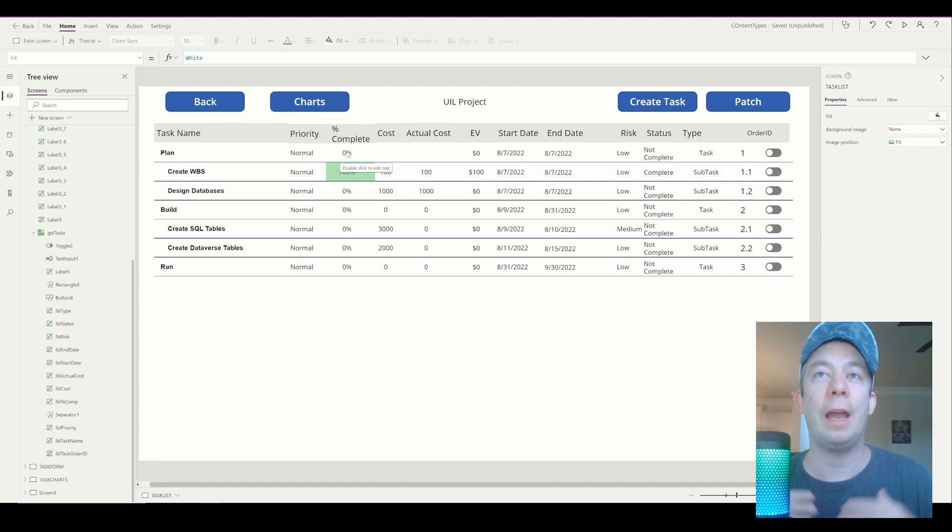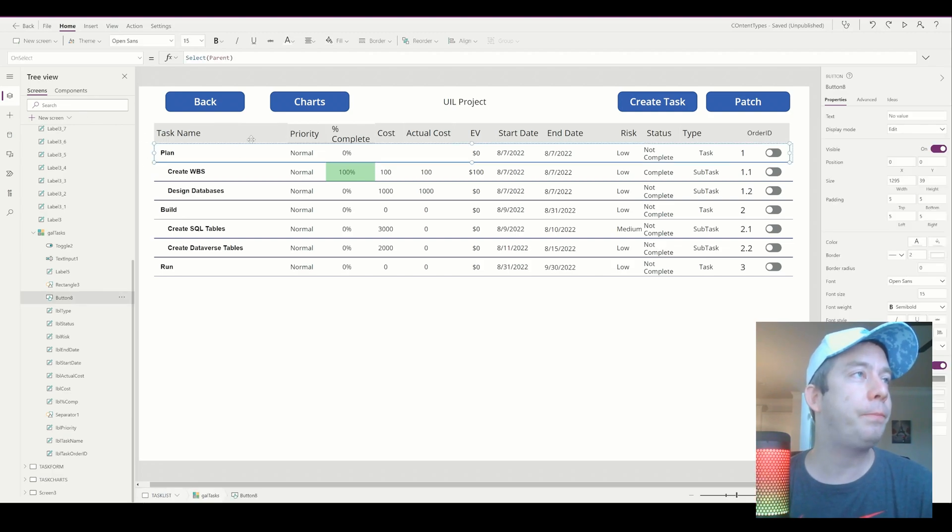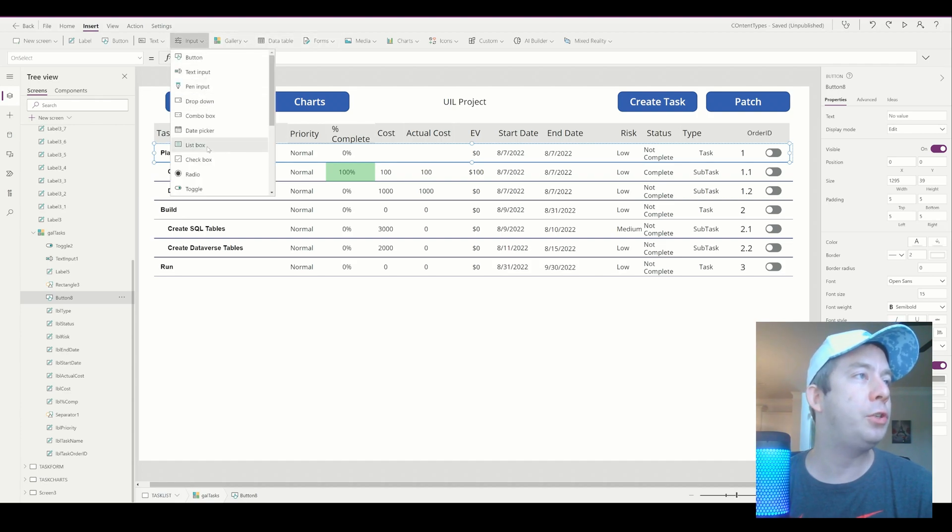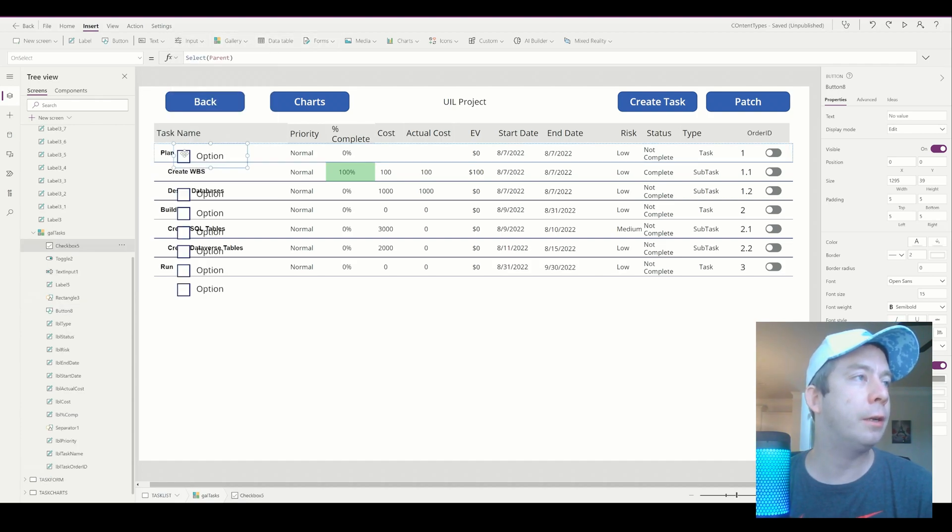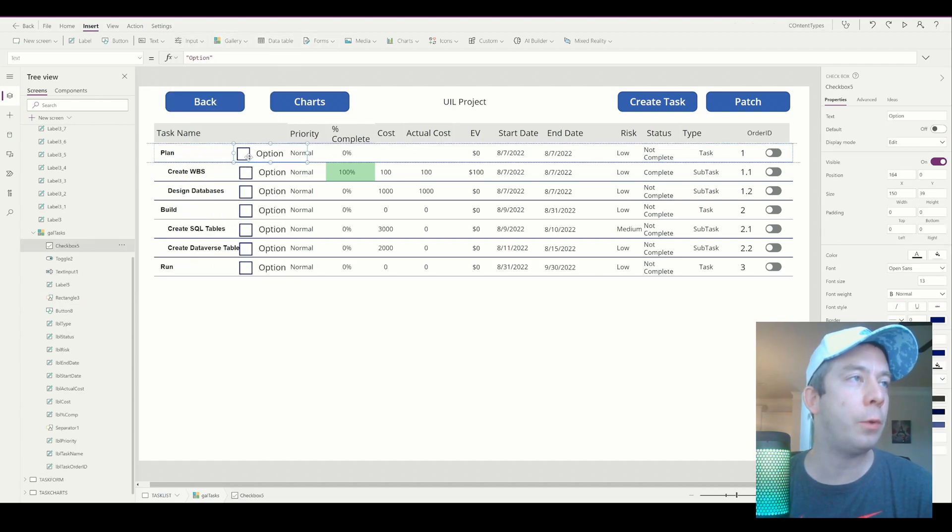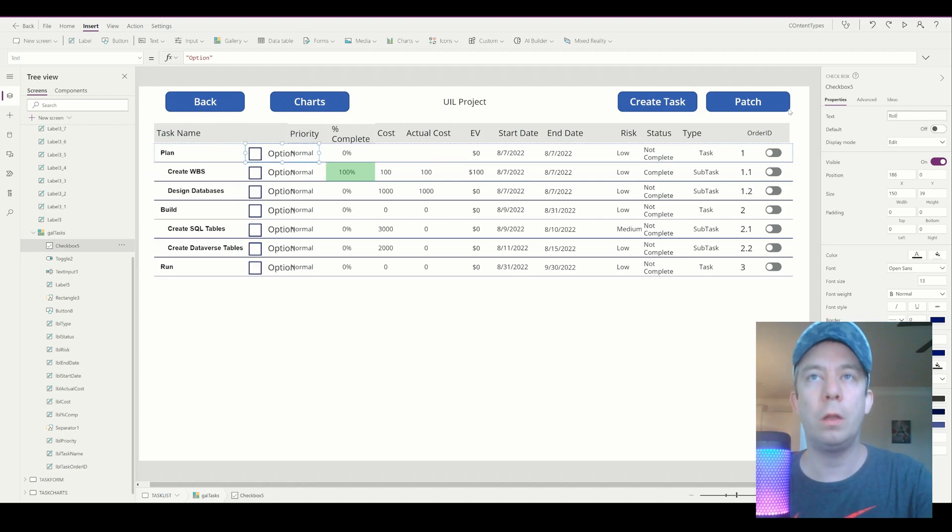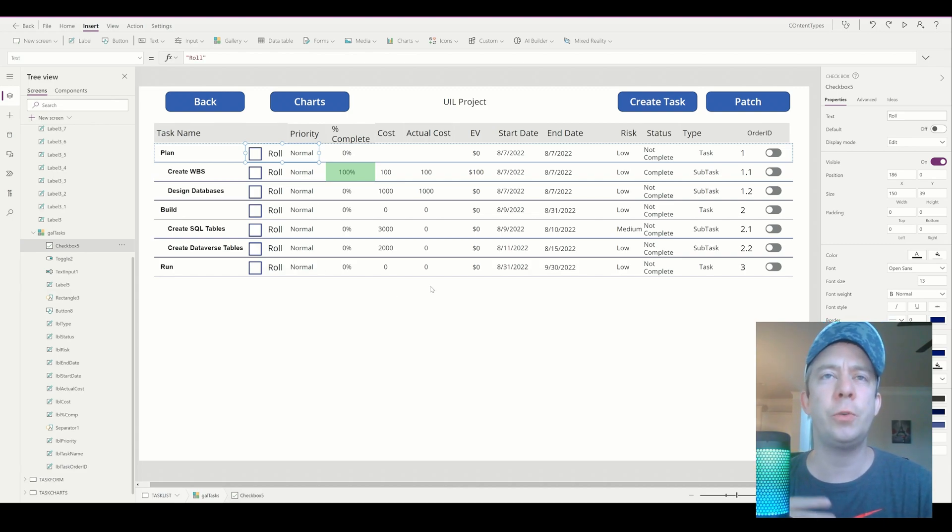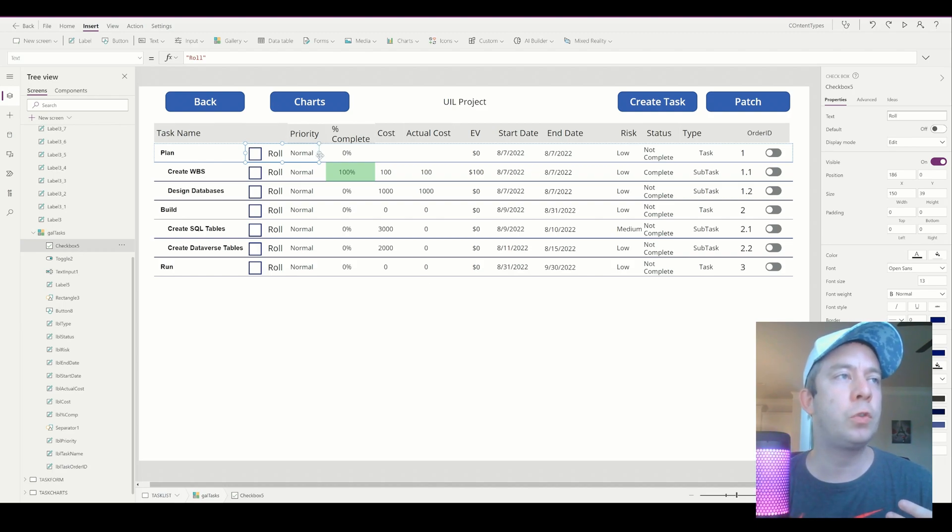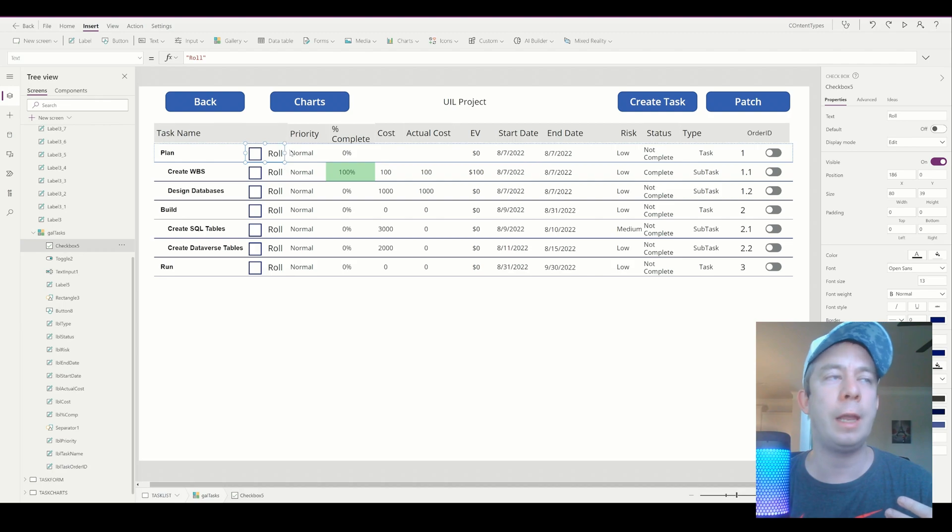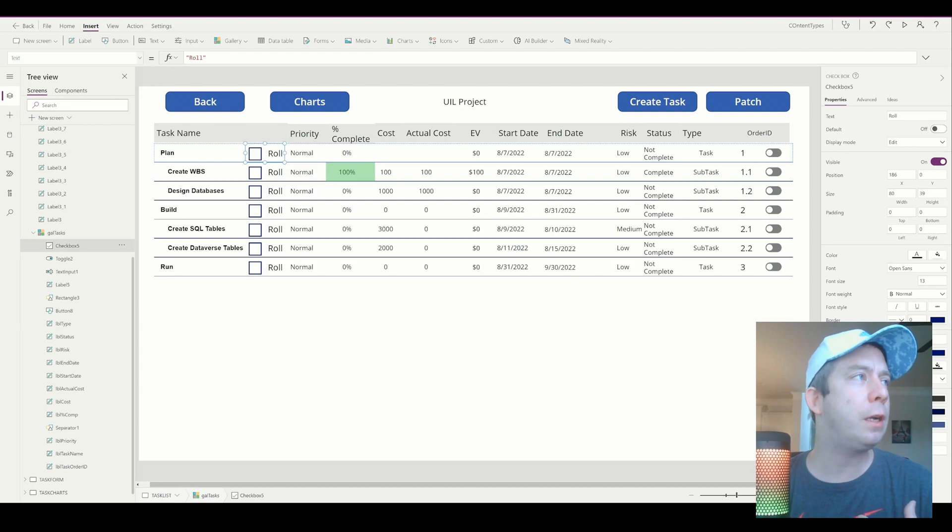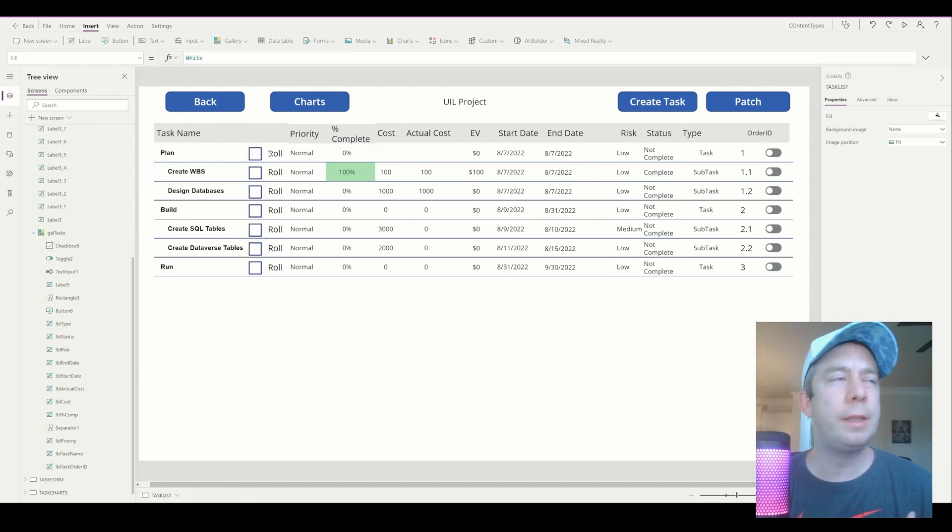So this is specific to my Power App where I was creating a task list. We want to auto-calculate things like percent complete based on if it's a task or a subtask. So the subtasks should auto-calculate to the percent complete. And I was thinking, how are we going to do that? I'm going to create a checkbox. So I'm going to input a checkbox in here and this is going to say whether we auto-calculate it or not. We'll just call it roll because it's actually like a roll-up, right?